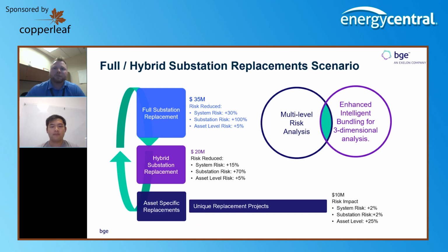And one of the nice things from this is that as we go through our project approval process, we're always looking for alternatives to whatever was proposed. Sometimes that can be relatively difficult for folks to come up with because it requires an analysis, and then you have to get budget dollars for what that alternative is, even if you're pretty confident you're not going to go forward with it. It starts to be a productivity impact. This tool allows us, through custom reporting, to pull out those three options and show them, regardless of what scenario we're recommending. We can have that information at our fingertips and include that in our processes.